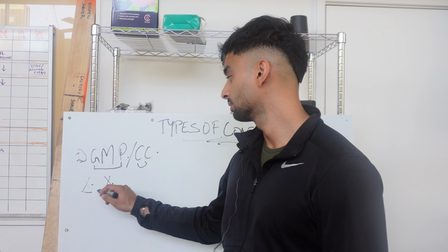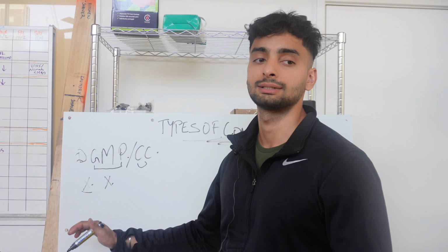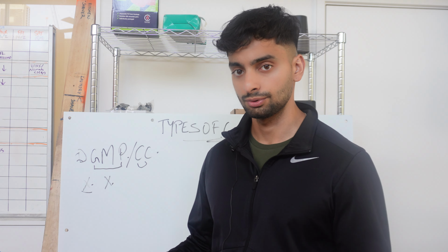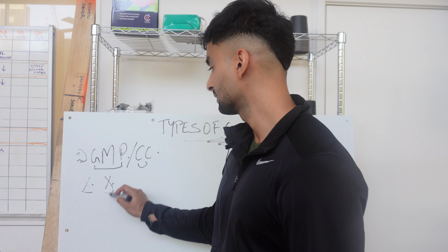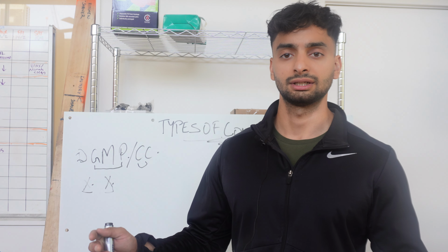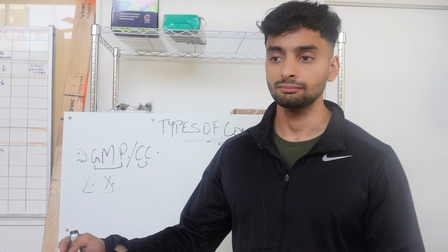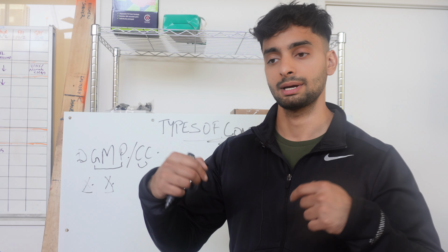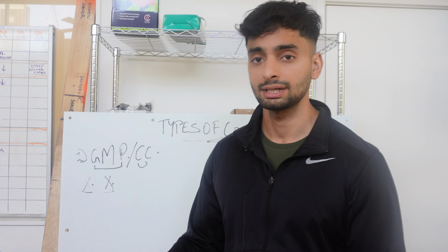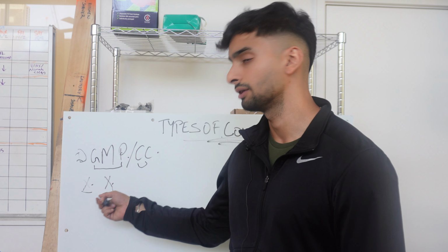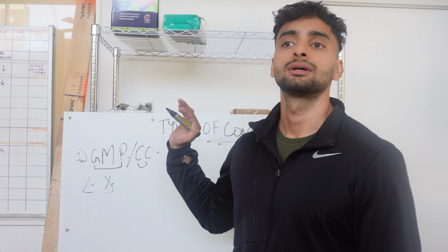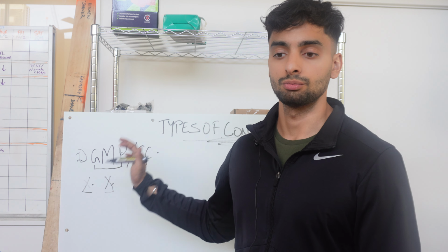Now, time usually is pretty hard to determine. It can go off the charts, sometimes blow up because of numerous things. But the cost in a guaranteed maximum price contract is capped. So if the contractor goes over the cost, think about it as being a developer. If you hired a contractor on a guaranteed maximum price contract, and the cost has exceeded the value of the works that are being completed on site, that's completely the contractor's interest. So they are going to bear that cost.